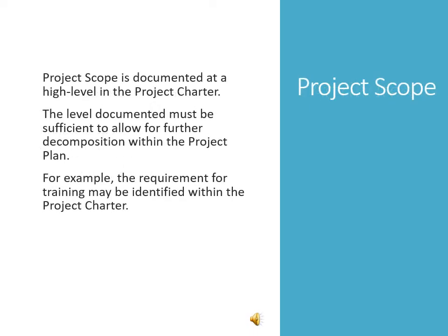What is the project scope? In fact, it is documented at a high level in the project charter. The level documented must be sufficient to allow for further decomposition within the project plan. For example, the requirement for training may be identified within the project charter. Requirement for training normally is the training need analysis.